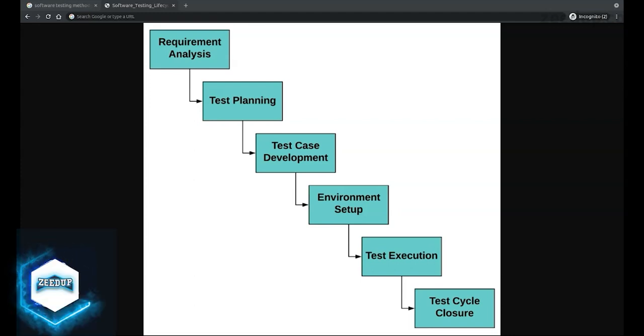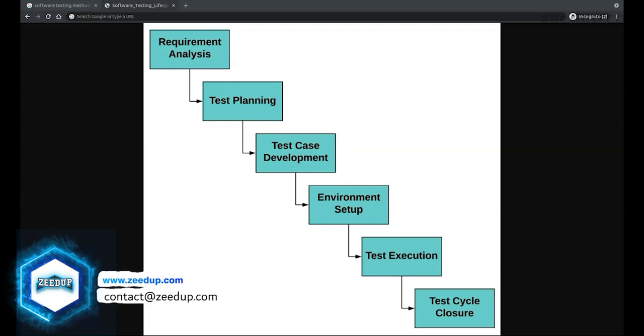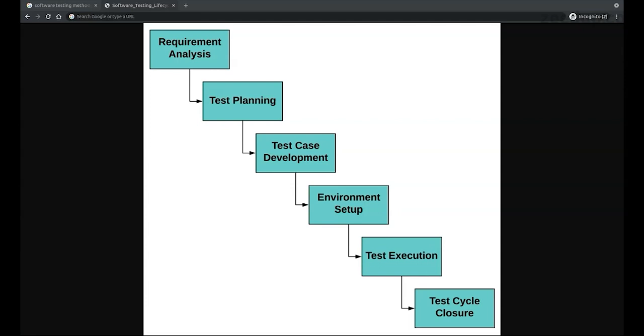Next is iterative development. Now, what is iterative development? In this model, a big project is divided into small parts, and each part is subjected to multiple iterations of the waterfall model. At the end of an iteration, a new module is developed or an existing module is enhanced. This module is integrated into the software architecture and the entire system is tested all together as one.